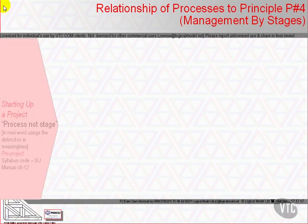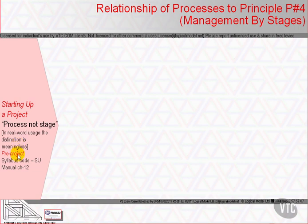The first process is Starting Up a Project — it's a process, not a stage, though in the real world that's a meaningless distinction. It's a pre-project process; its syllabus code is SU and its manual chapter is 12. It defines task and team, examines relevant lessons, and sets up the initiation stage's plan and control regime.